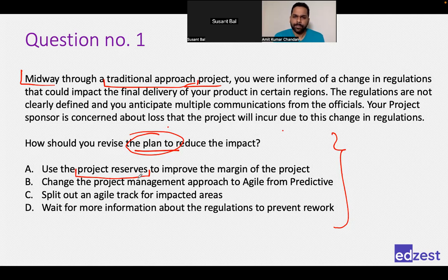Yes. So the budget would come from management reserve, but we need approval over here. When you say budget, we are talking about something that we have committed to, something that we have asked for as project manager. In that budget, money will be added, so my budget will be increased if they are putting in money. I understood, but that term is not budget, and that's why I was talking about this. It's not a part of the budget. It will come additional to the initial budget. It will be a revised budget. Yeah, absolutely.